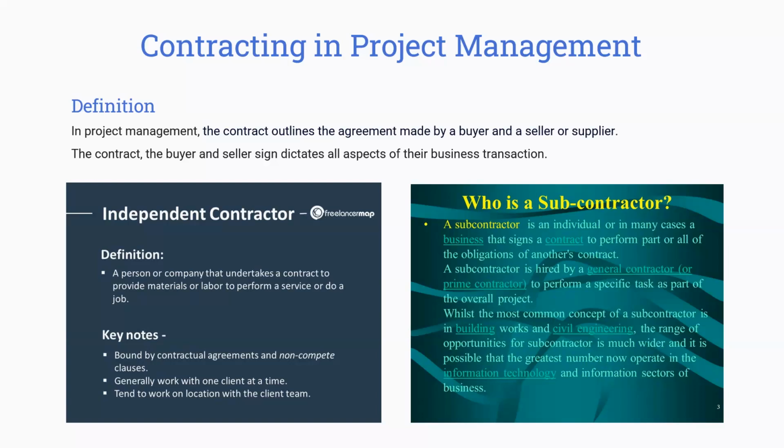say the quality is not good, then the complete responsibility for the product, the raw materials, goes to the prime contractor. That person or that agent is completely responsible. Here the agreement is always between the organization and the prime contractor, and no communication is done with the subcontractor.